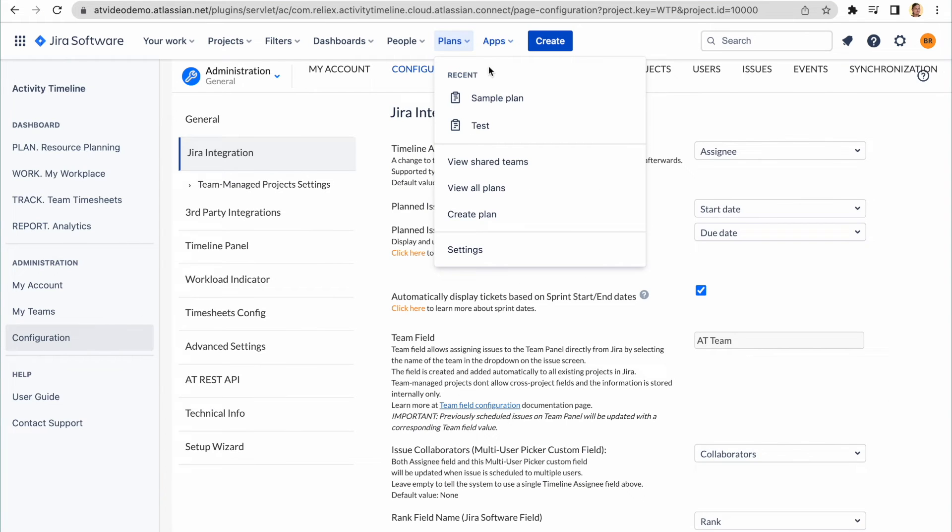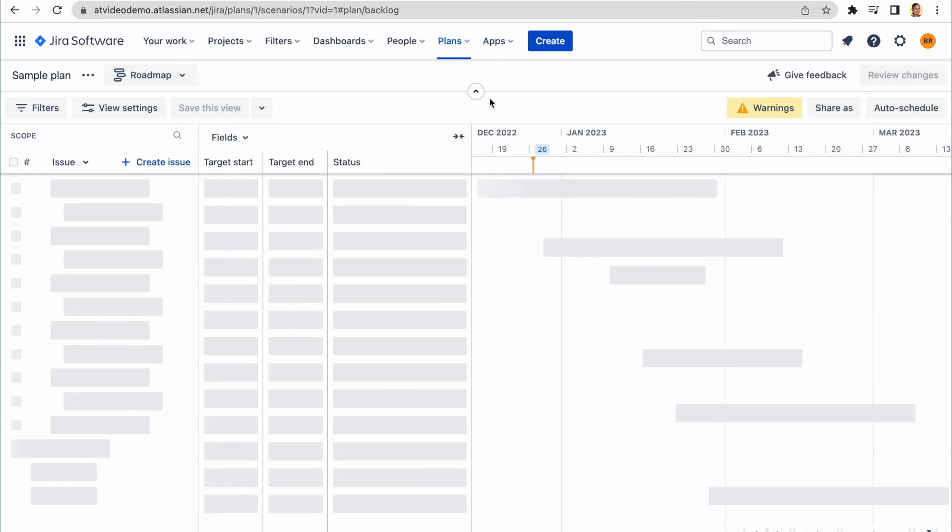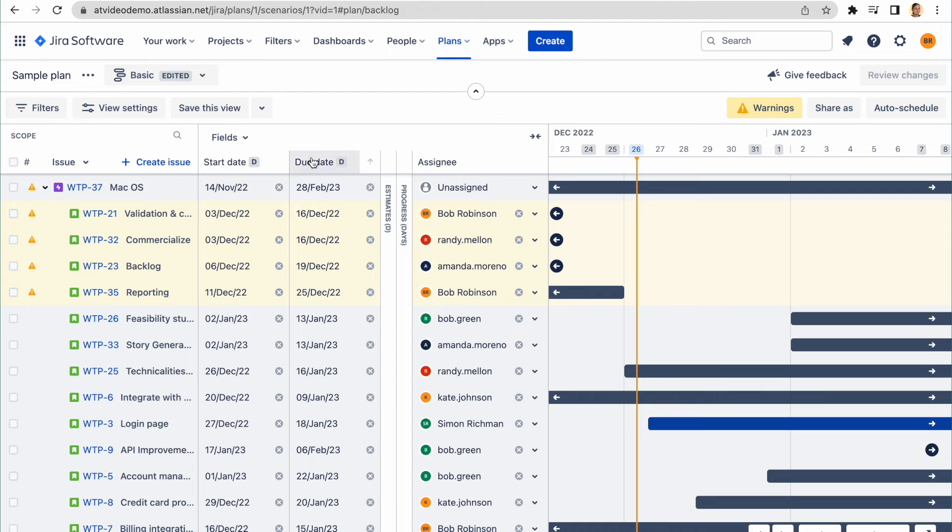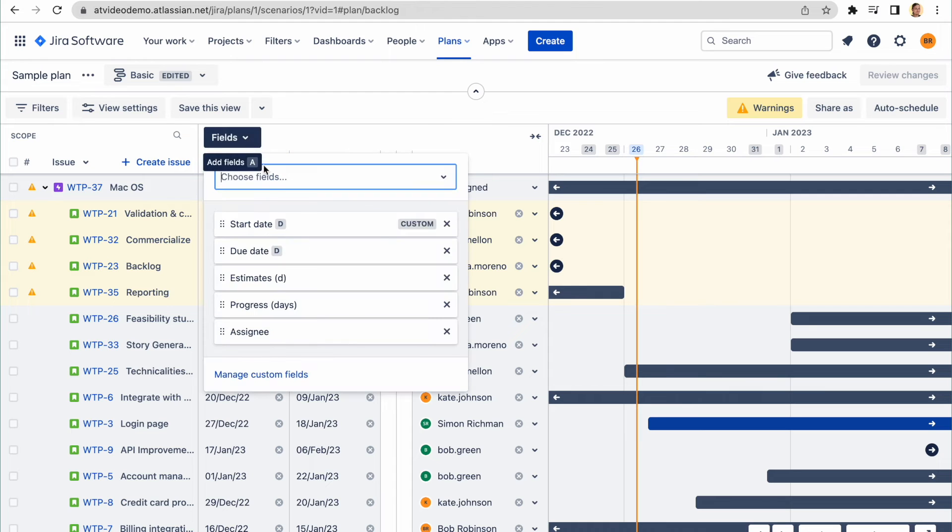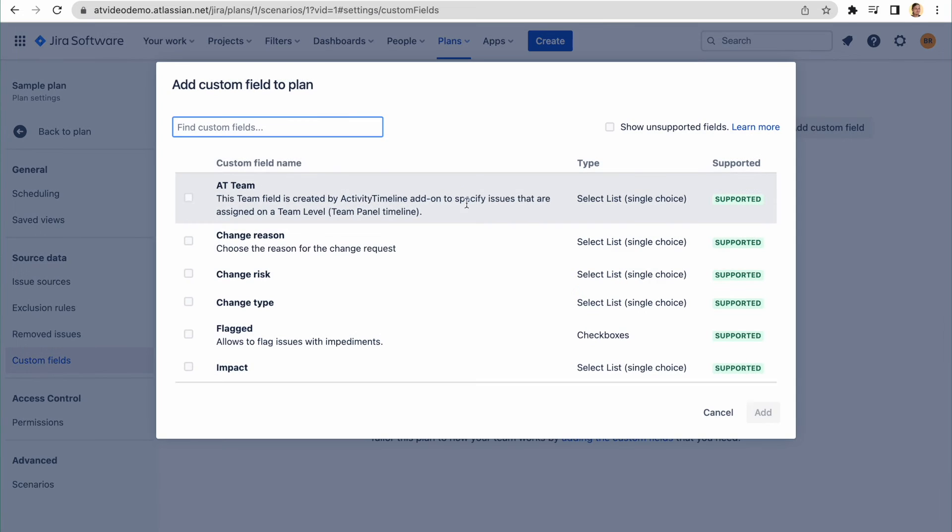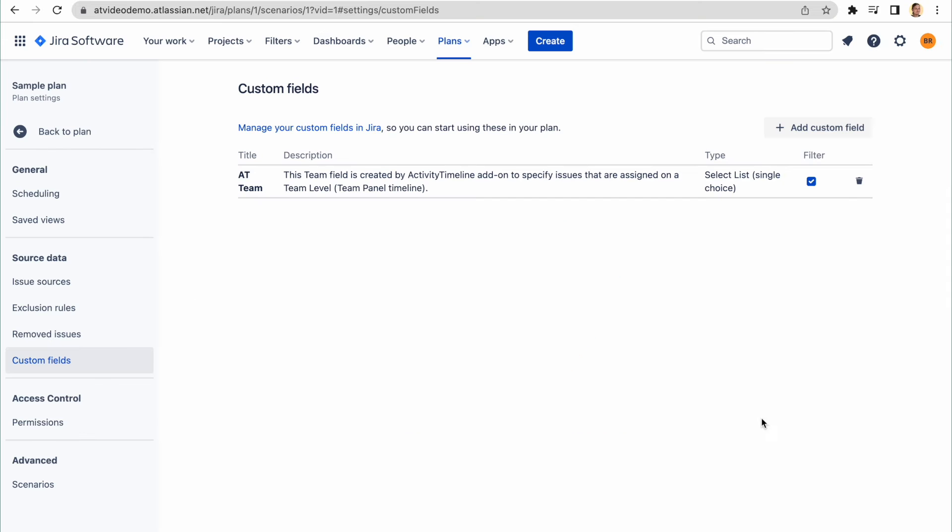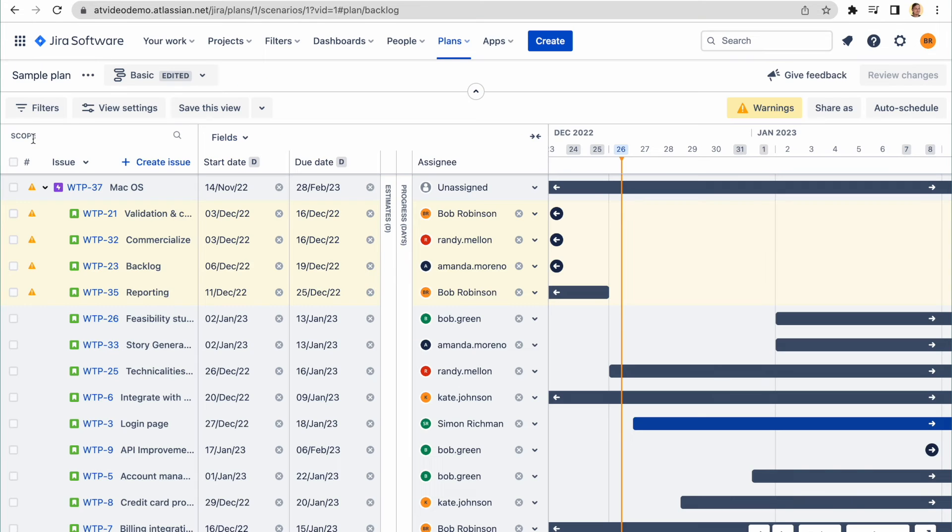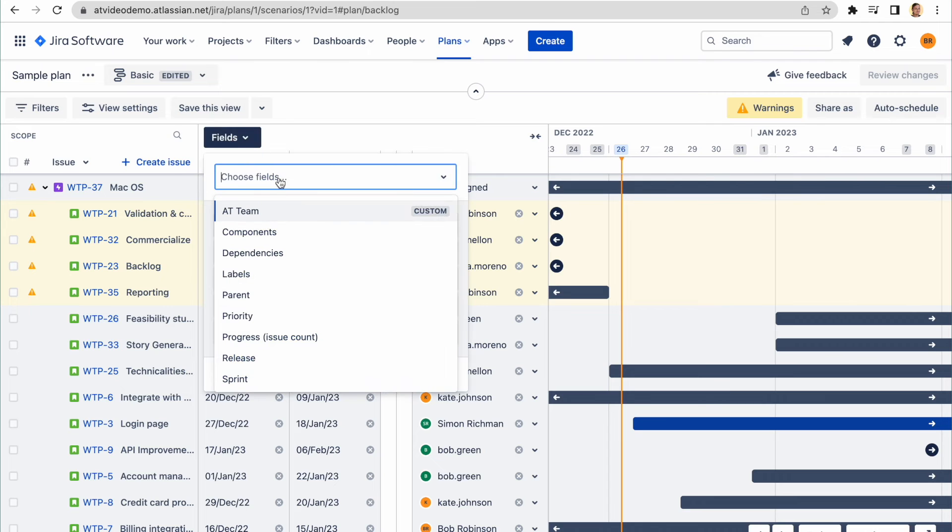Then, open Advanced Roadmaps, Fields, Manage Custom Fields, and click to add Activity Timeline field in the list. Once this is done, go back to Plans and add this field into the list of displayed fields.